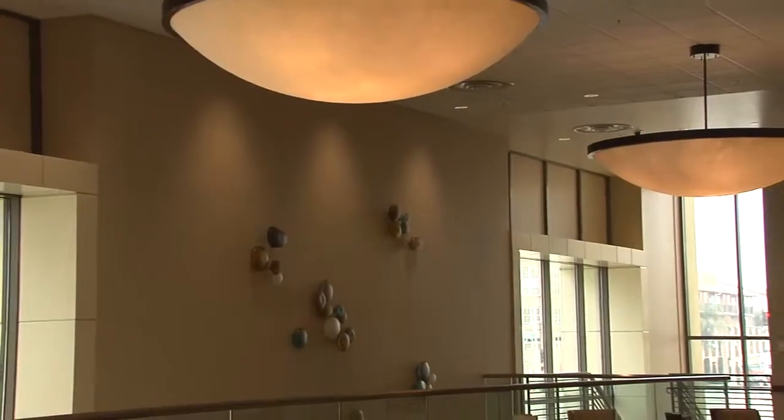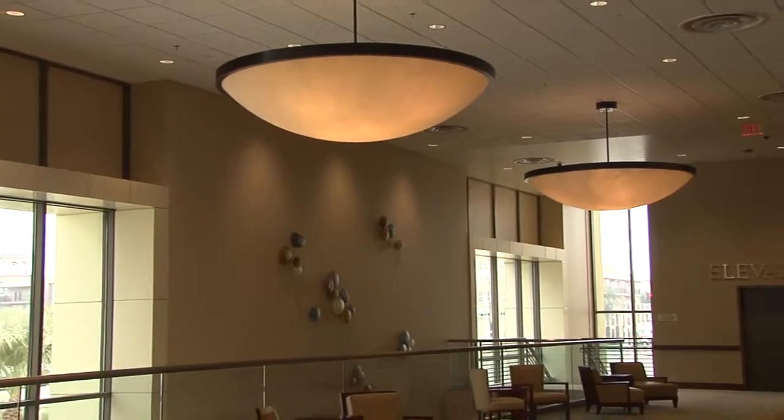So when you were first designing these, you had to put a mock-up up to test it out and see how it looked and judge for size and whether it was right. Give us a brief step-by-step on how that worked. Well, originally these were a 4-foot diameter. They're an 8-foot diameter now, so we put a 4-foot up for the city to come out and review it, and they could tell that they weren't big enough for the area. So then we put an 8-foot circle up and put a bowl up so they get an idea what it would look like fully lit up.